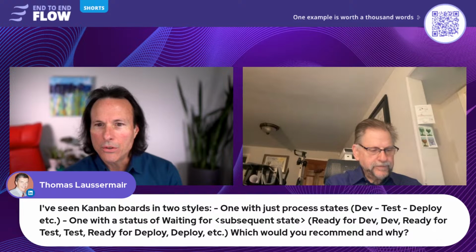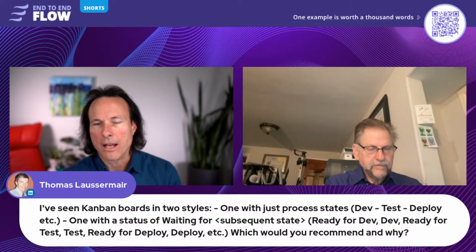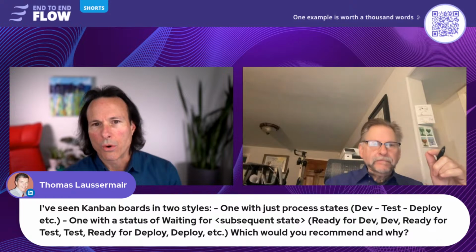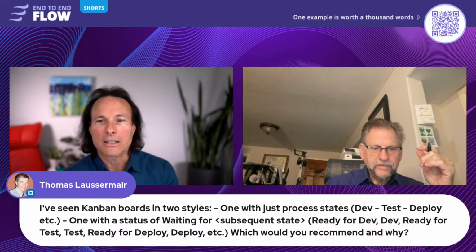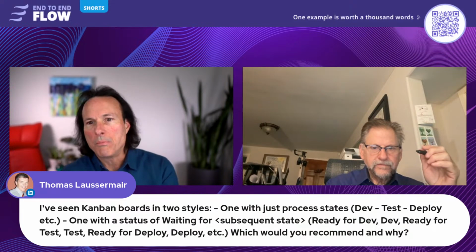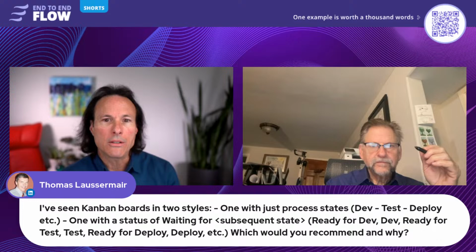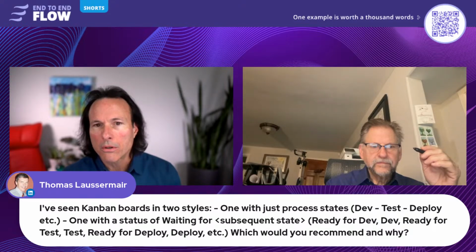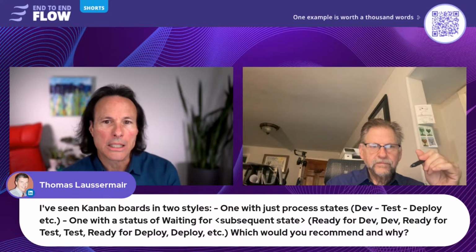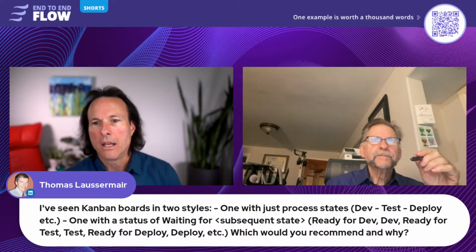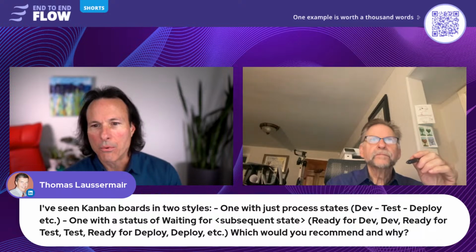And when you have those holding queues, there's a lot of data that you can get from that. Like, why do you have so much work in one of those queues? Are you short on testers? Do you have 10 developers for every team member that's got the testing background? Or if you've got a lot that's waiting for validation, is it because you've got an absentee product owner? What's causing that? So there's so much more you can glean from having that second approach.